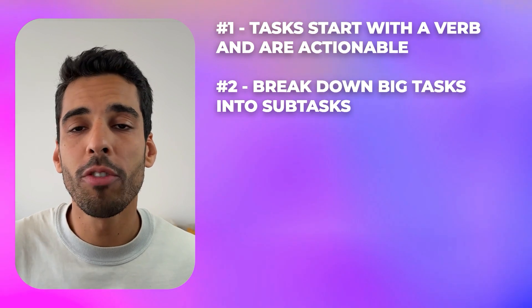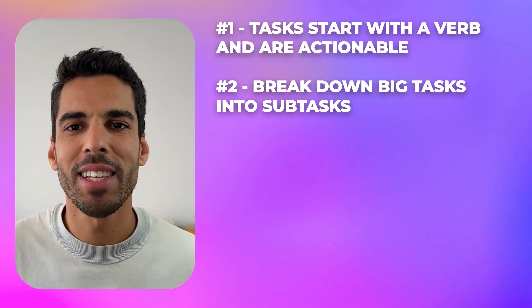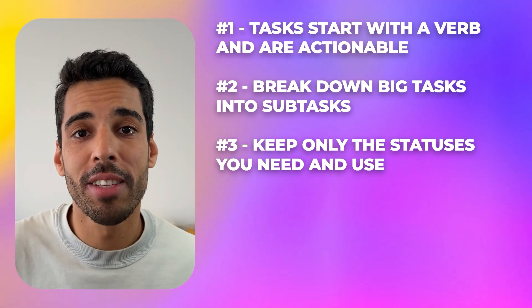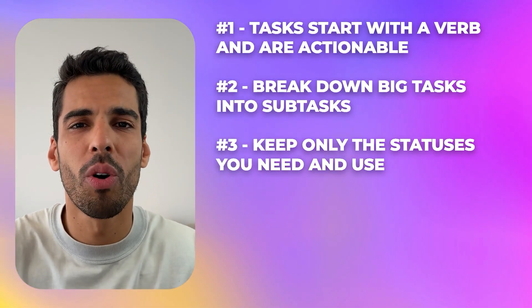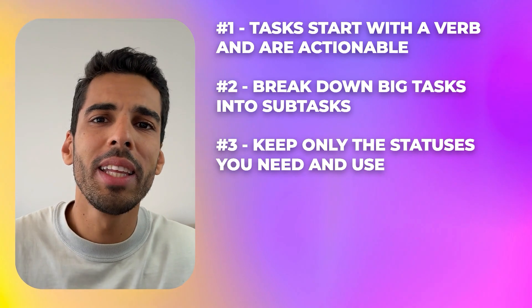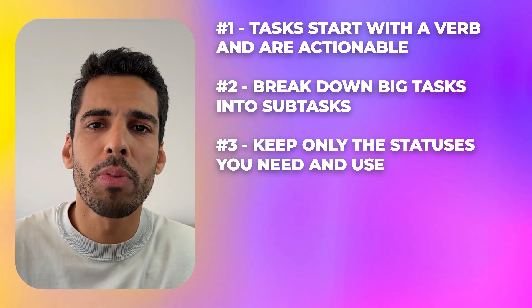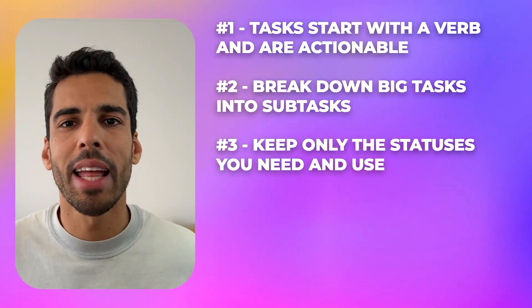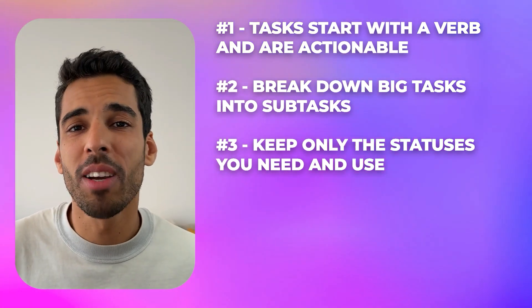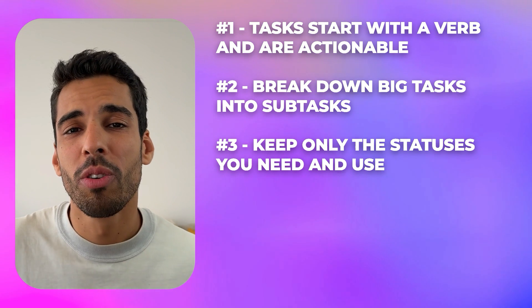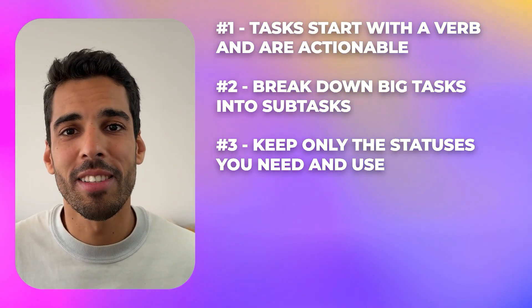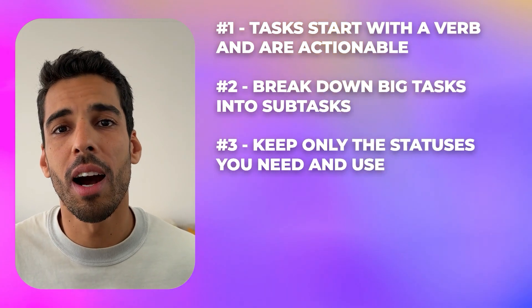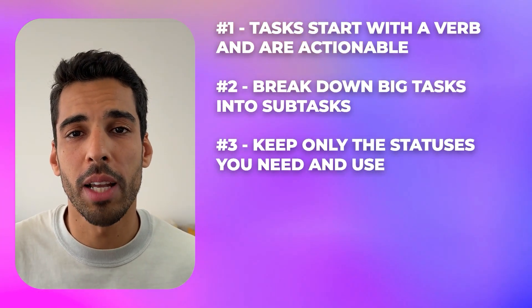I see way too many tasks with four or five assignees and in the end, no one moves. Third point: don't use temporary statuses like 'waiting for validation' or 'to send' if you don't really need them. A status should represent a state that lasts over time, not a mini action that takes a few minutes. It might be controversial, but sometimes you don't even need an in-progress status. For most teams, three to four well-thought statuses are enough, even with a super complex workflow.